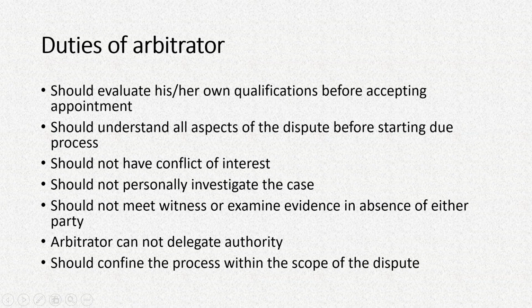And also the scope should be maintained, that is, the process should be confined within the scope of the dispute. For example, if the dispute is in the item of earthwork, then they should not generally discuss another item where a dispute may even be there.